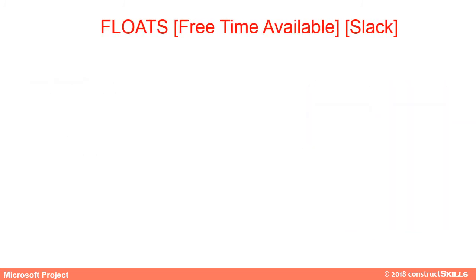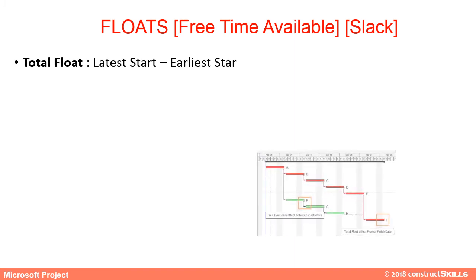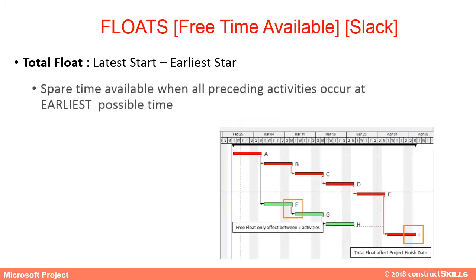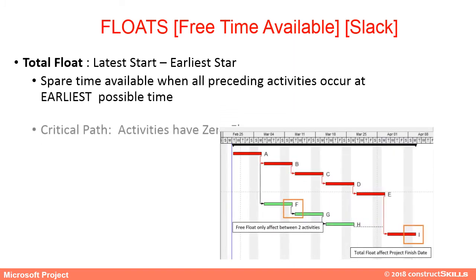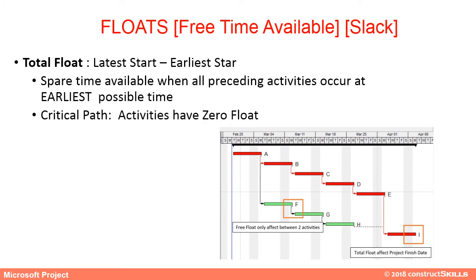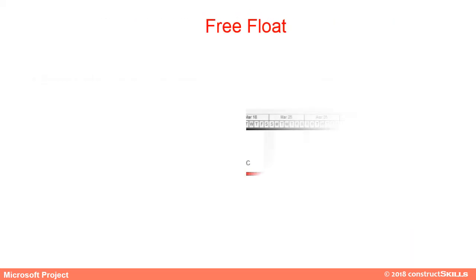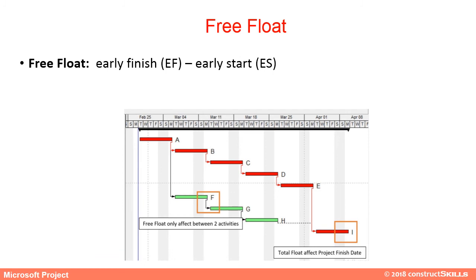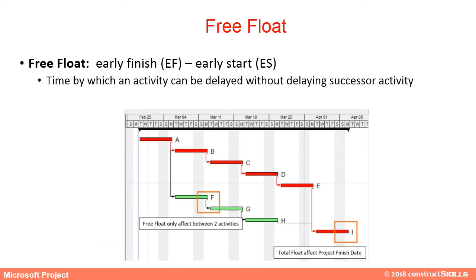Free time available to a task is called float, and it is of two types: total float and free float. Total float is the spare time available when all preceding activities occur at the earliest possible time; critical path activities have zero total float. Free float is the early finish minus early start — it is the time by which an activity can be delayed without delaying the successor activity.